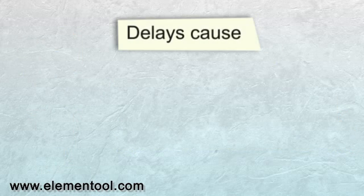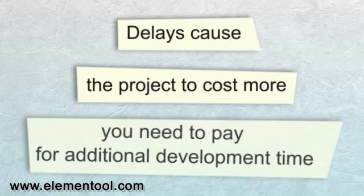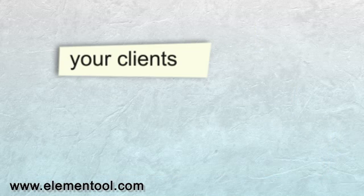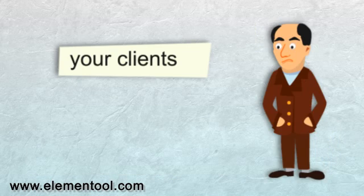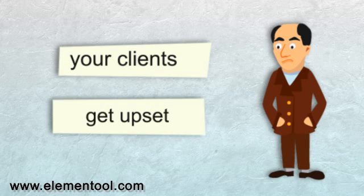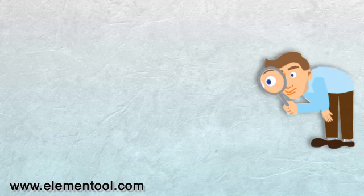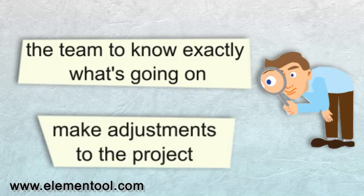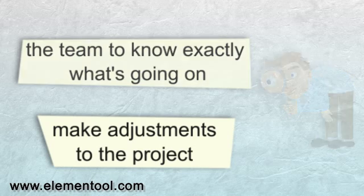Delays cause the project to cost more, because you need to pay for additional development time. They also cause your clients to get upset, and this is something we really want to prevent. Scrum enables you to keep everything visible, and it allows the team to know exactly what's going on and make adjustments to the project to keep it moving forward.